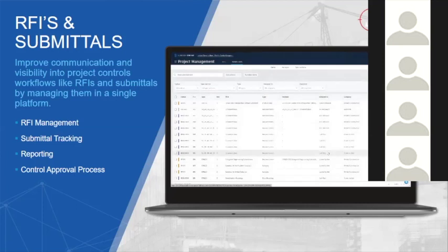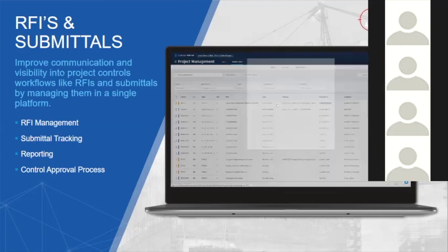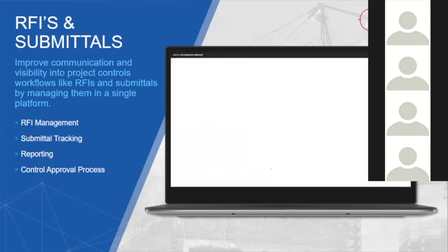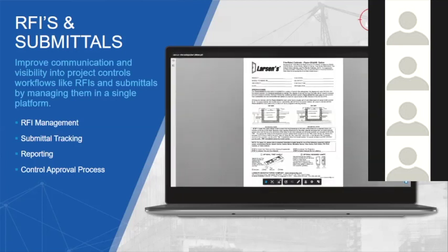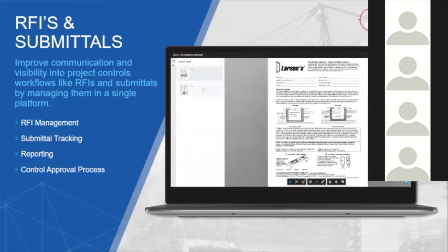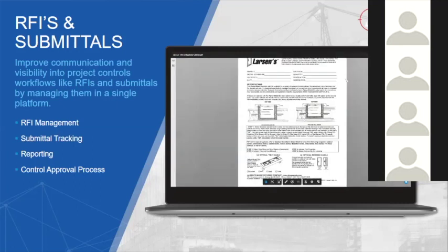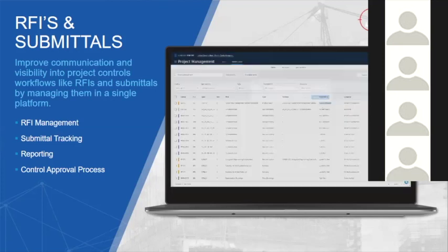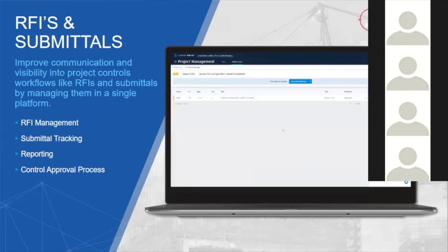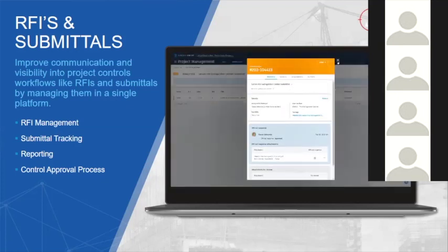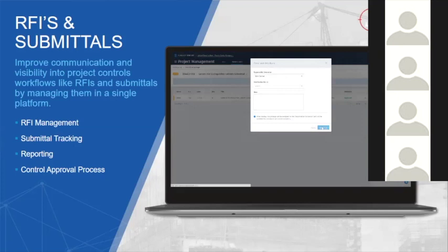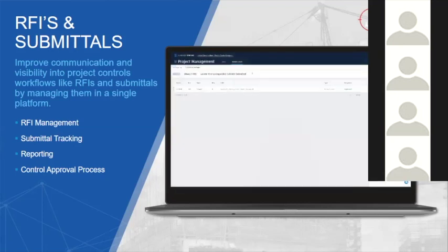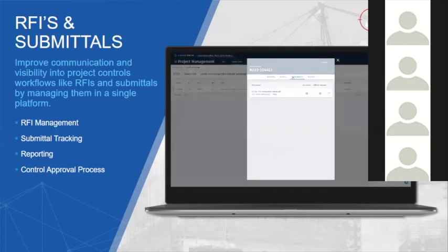And here, one more good option is that we have a reminder. When you send a mail for approvals, it will take a lot of time. Many people won't look at mails for this kind of approval, saying okay, we'll see later, we'll see later. They won't give the approval. But here in the RFIs and submittals, you will have reminders, where you will get a notification that this has been pending for so long and you have to approve it. So like this, there will be a lot of reminders, so people won't miss the approvals.